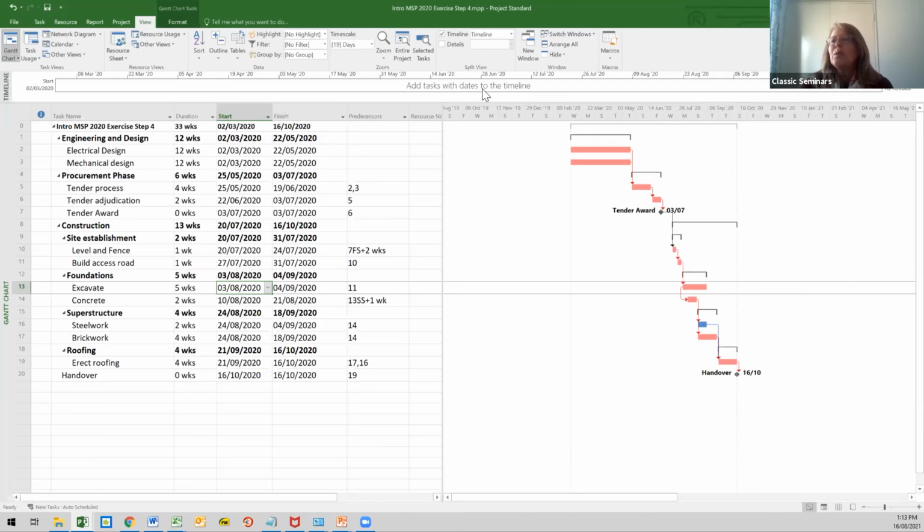And so what we generally do is we put in level 1 WBS headings, so very high-level items, and those dates will come in automatically as we put those WBSs on. And then we also normally put on milestones. Milestones are useful to have in a timeline because they show us there are markers in our project as to where we are or where we should be by certain times.